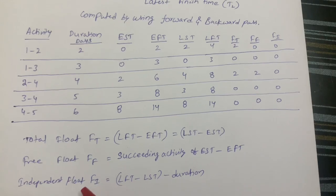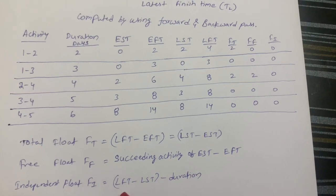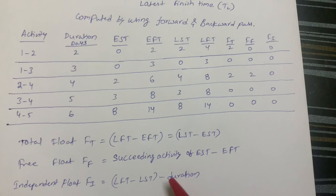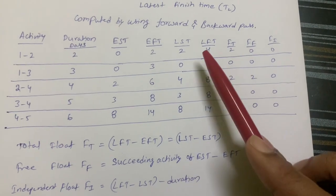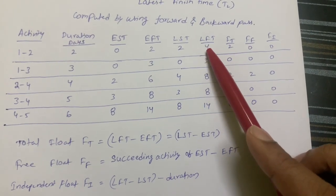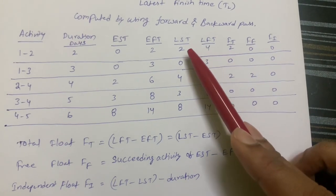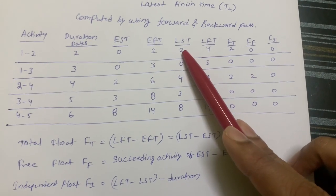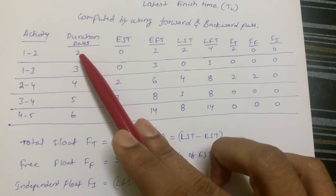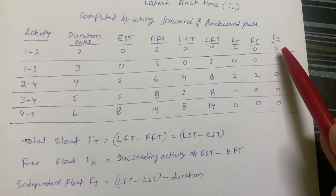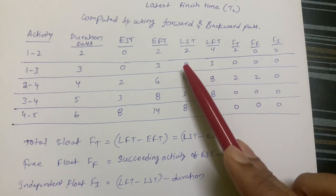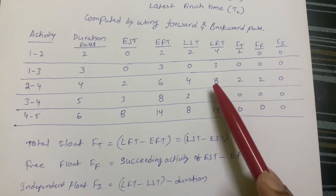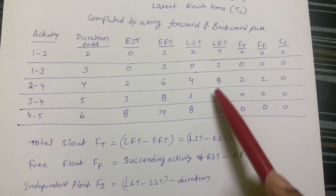Independent float formula is: LFT of preceding − LST of succeeding − duration. For example: 4 − 2 = 2, and 2 − 2 (duration) = 0. Similarly, 3 − 0 = 3, and 3 − 3 = 0. All independent float values come out to zero.